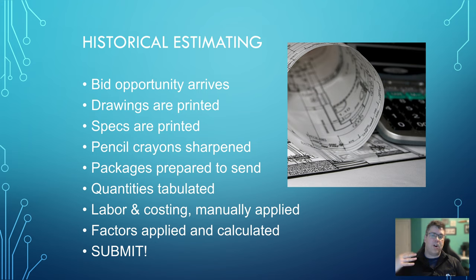Labor costing, all of that is manually applied. The very first estimate that I ever did, when I was starting out as a junior estimator, I sat down in my cubicle. It was week one in estimating. The chief estimator came over, dropped about 100 takeoff sheets, handed me a red book for the pricing, a labor manual for the labor, a calculator and a pencil, and he said, go. I thought it was nuts, but nope, he was serious. I had to flip open the labor manual, pencil in the unit labors, and extend everything out by hand. It was incredibly labor intensive to perform.